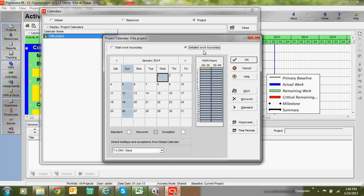In the detailed work hours section, you can identify how many hours are worked per day — in our case 10 hours. You can also specify when work starts and when it finishes, and what the lunch time is. For example, work can start at 8 o'clock.